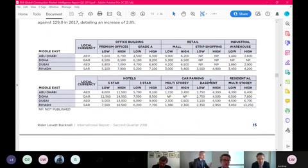So you've got various provisions for the Middle East, and then you can see the areas, locations are Abu Dhabi, Doha, Dubai, Riyadh. So you've selected, presumably, the Dubai line, read across from there, and found what the rough construction costs per square metre. Is that right?